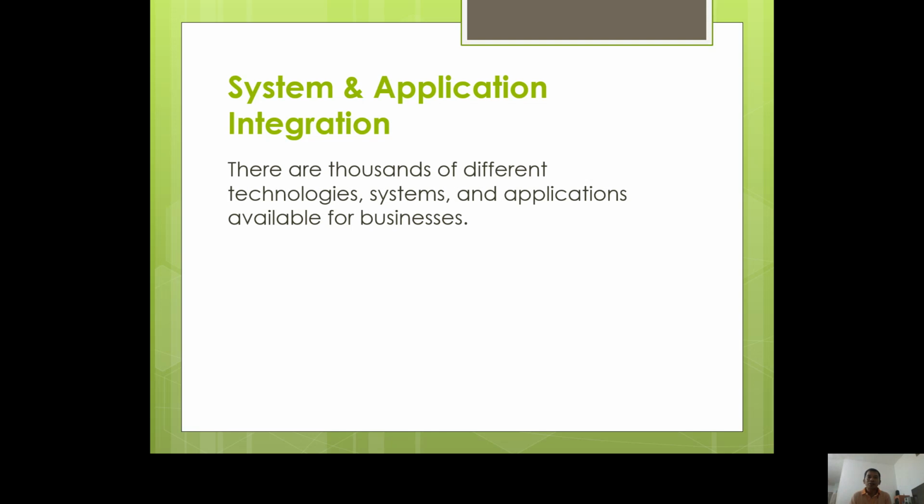The system and application integration. There are thousands of different technologies, systems, and applications available for businesses. Integrating third-party or other custom applications such as your ERP systems, website, or inventory management database adds substantial complexity to your project. And the bigger challenge with integration is that the issues hide through the development process and surface only at the end, leading to extra costs, delays, lowered quality, and sometimes even failure of the project.